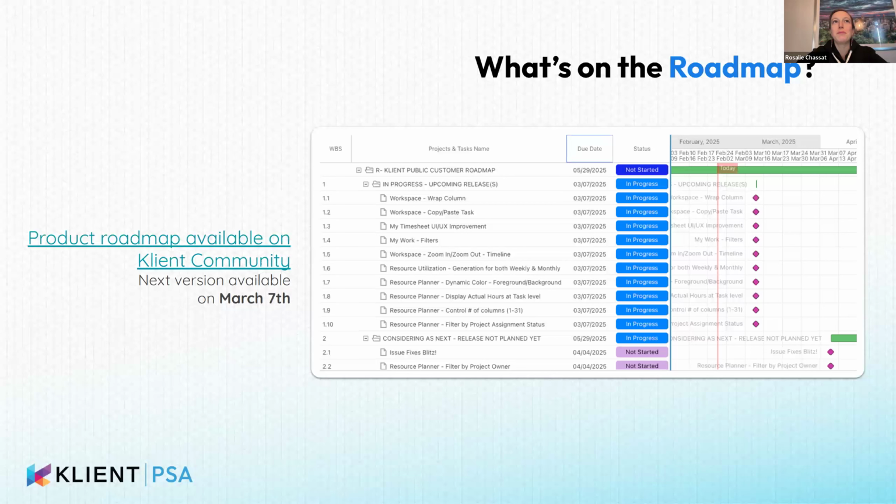And the last one, maybe you have a bit more details on that one, Yanick, is scheduling patterns. I think you touched on it on a January webinar. So I don't know exactly how that's going to look in the product, but right now we don't have scheduling patterns. Mainly what we have is either a fixed duration, fixed effort, and we like peanut butter spread or we split equally. So now we're gonna add some, but the first one we're starting with is really the number of hours per week, per month. So we're gonna add one at a time. Yeah, we're adding some of those patterns in the next few releases.